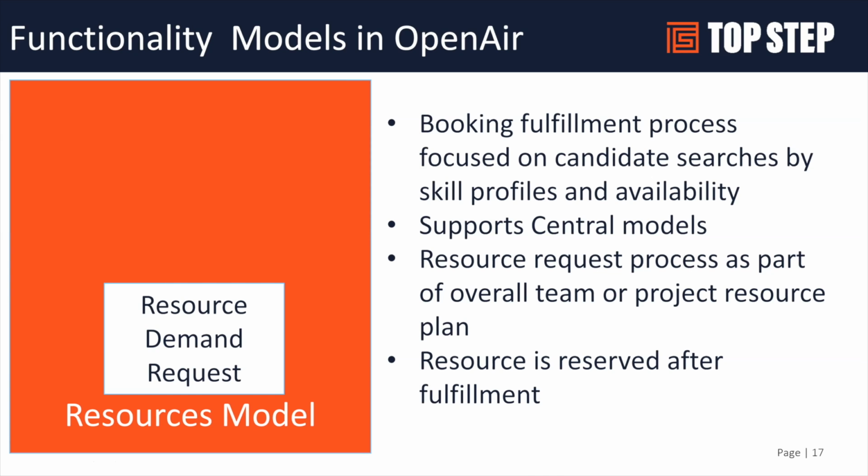The resource demand request. We probably don't see this one as often because it really is a very heavy feature. What I mean by heavy is it's a very powerful feature, but in my opinion, it's got a very specific use case. We've implemented this for a handful of customers because they really had a need that this filled. It's also a very process-driven feature. What it really does is allow you to create resource queues of needs and then have the resource teams fulfill those queues through the search process.